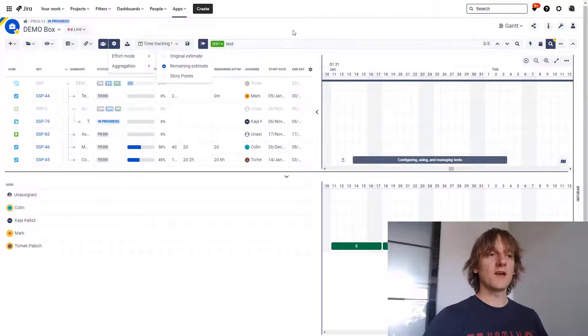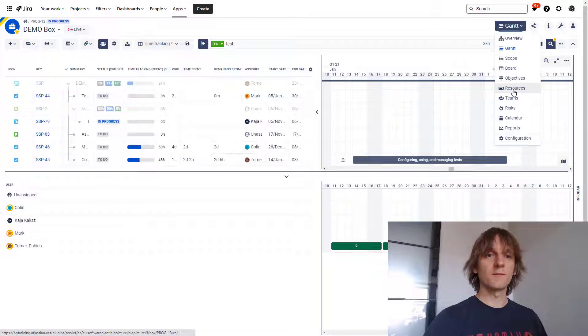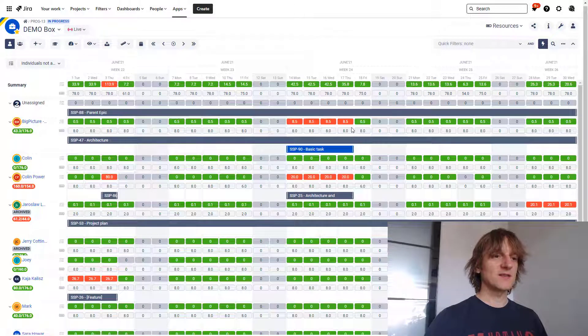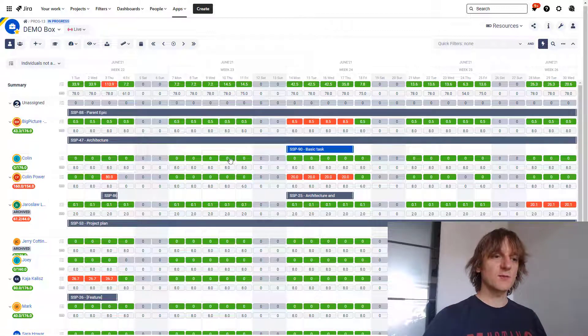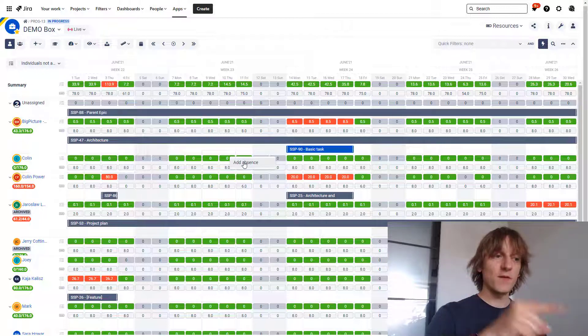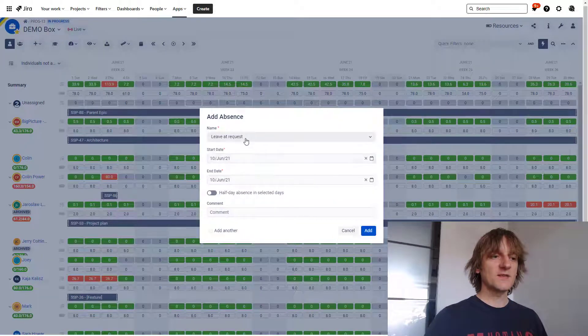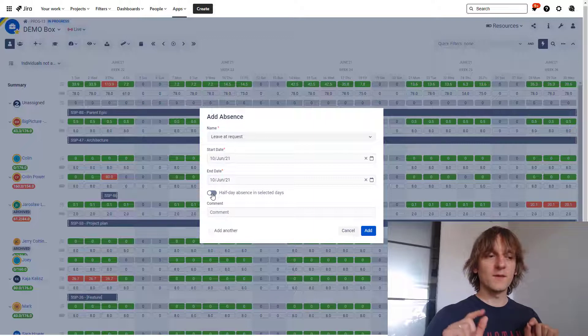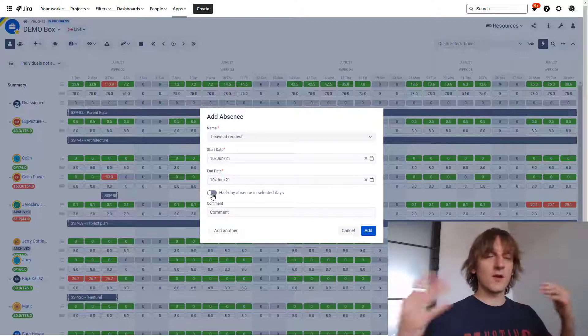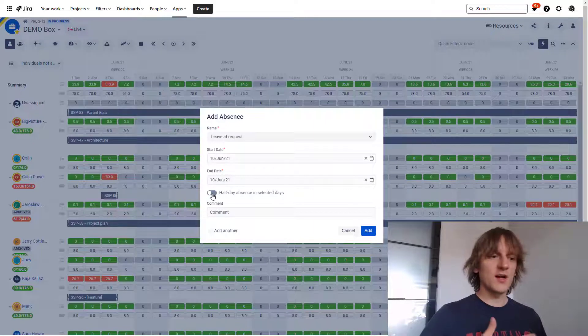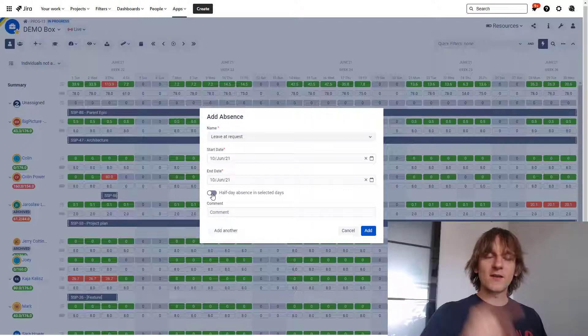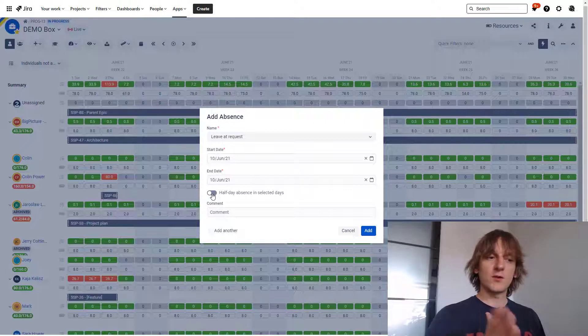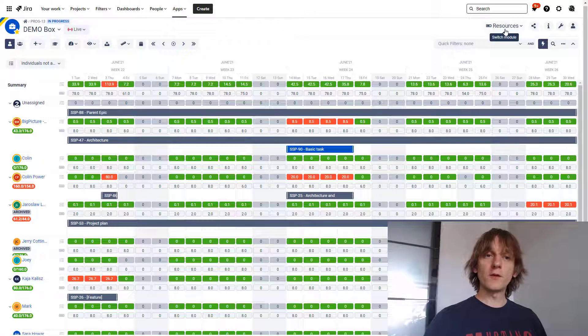Talking about resources, let's switch to that module for a moment, because over there a new small feature has been added as well. If you look at your time frame and your allocations, when you right-click on the allocation on a specific day, you can now choose from over here to add an absence for this specific user. And then you have to select the absence type or absence reason. The dates are pre-populated for you automatically, and you also get an option of registering a half-day absence. So that's pretty cool, because, you know, it happens that somebody is not gone for the whole day, but maybe has to go to the doctor with the child and will be off just for half a day. So now this option is also available over here, and it's also available in other settings, general settings that allow you to add absences. So not only on this screen, but basically everywhere where you create an absence definition.